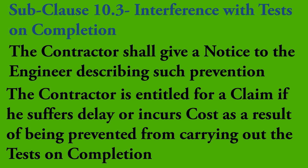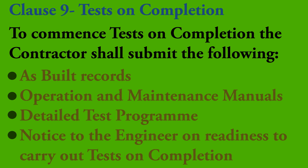Since sub-clause 10.3 is directly connected to tests on completion, we'll look at the relevant clause. Under sub-clause 9.1, the contractor shall submit as-built records and O&M manuals before commencing the tests on completion. The contractor shall also submit a detailed test program 42 days before the planned start date for tests on completion and obtain a no-objection notice from the engineer. Further, the contractor must notify the engineer 21 days before the date they are ready to carry out each of the tests on completion. To apply sub-clause 10.3, you must first check whether the procedure in clause 9 has been followed.